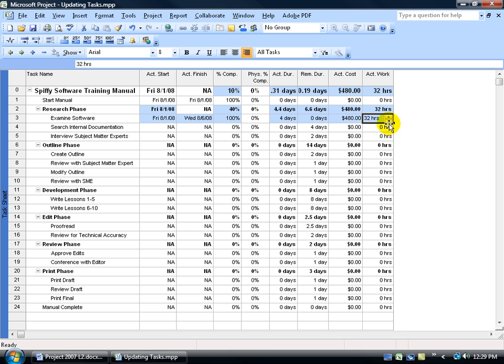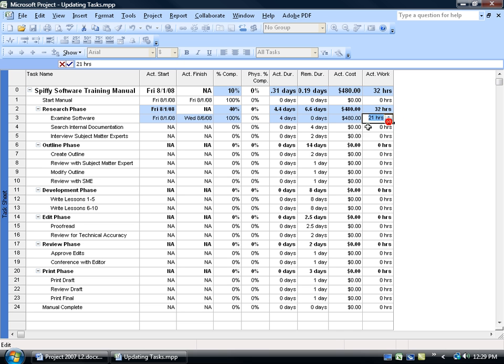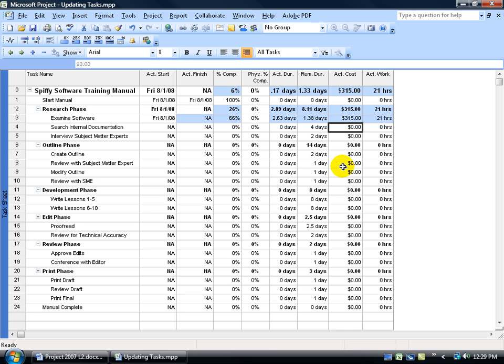And of course, if it wasn't 32 and we mark down the hours to, let's say, 21 and click off in a blank area, it automatically does the calculation and it says OK, you only have 66% of this completed.